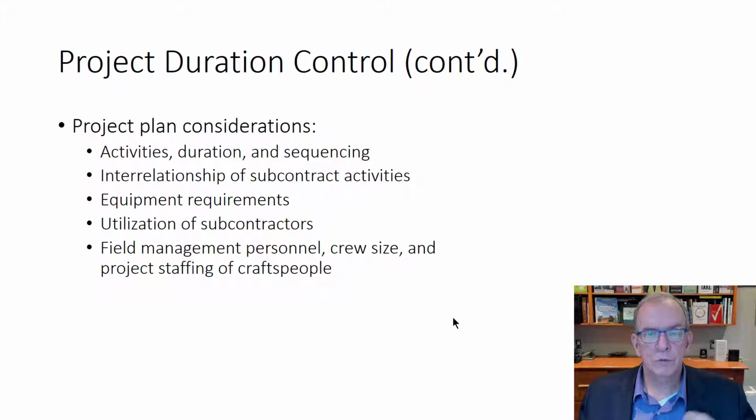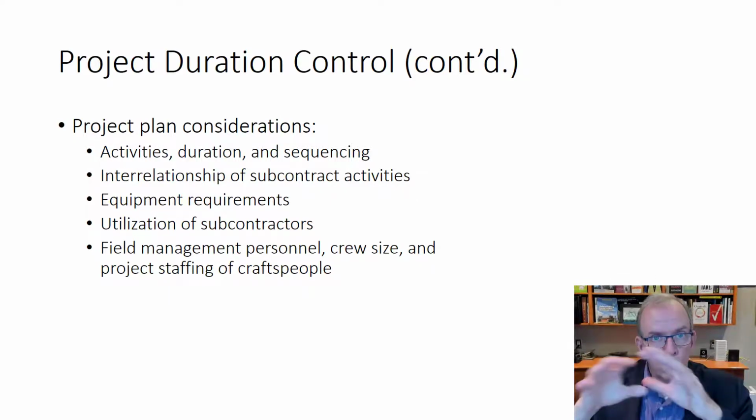in the project. And a work breakdown structure is where you take something large and break it down into components. And then you break those components into further components. You get engagement with the people that are involved in the work because nobody knows everything, no one person. So it's a collaborative effort when it's done well. And what's the best sequencing and the interrelationship between the activities? That also ties to the master plan and the short-term schedules.